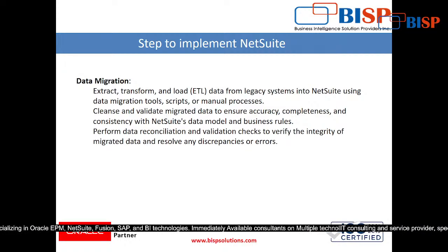And then once the data is validated in sandbox, it will be migrated to production. Again, in production also the same data should be reflected. In sandbox it was showing 20,50,000 in the February month revenue, and the same thing should be reflected in production. So that is called validation check at every point. So these are the 2-3 points where we do the validation check, right?